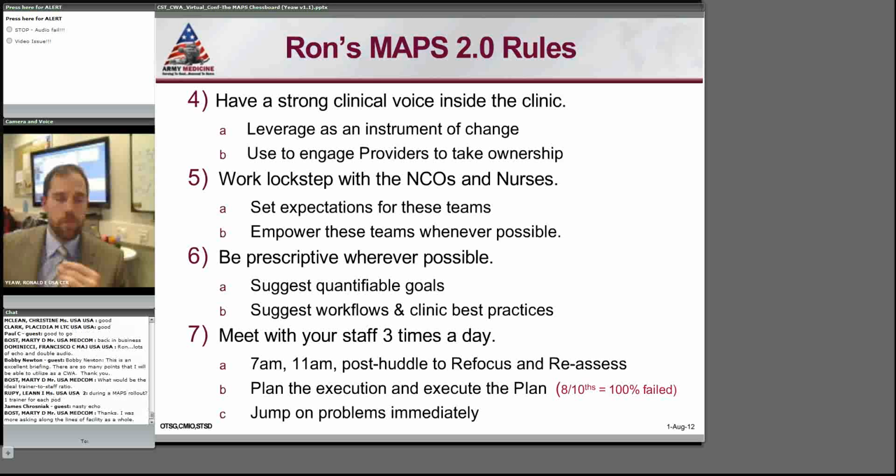Let's see. Let's move through here. I've talked about being prescriptive. Meet with your staff 3 times a day. It seems silly, but when I do a MAPS 2.0, I talk with my staff at 7 a.m., I talk with my staff at 11 a.m. and after the huddle.